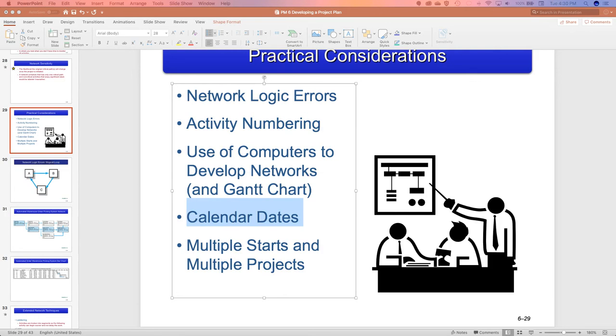Okay, 5 days per week. So 360 days in a year, 30 days in a month, 12 months per year, 5 days per week, right? So far, so good? All right. Generally, we monitor activities in days unless it's a very short duration project, which we can switch to hours at that time.